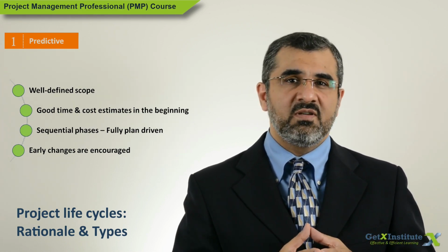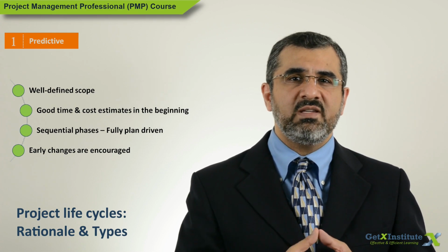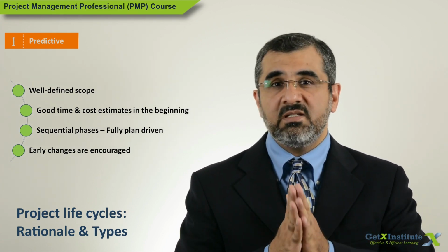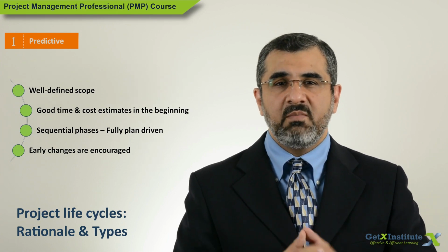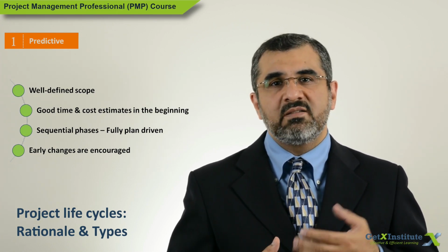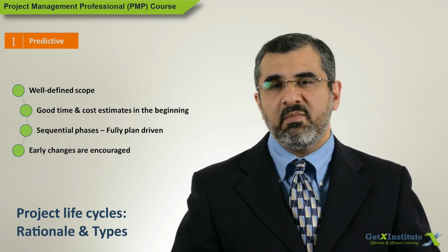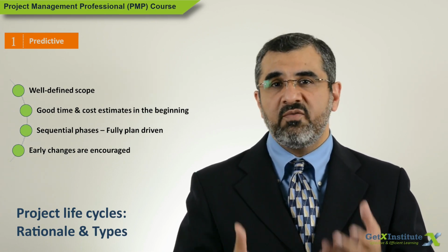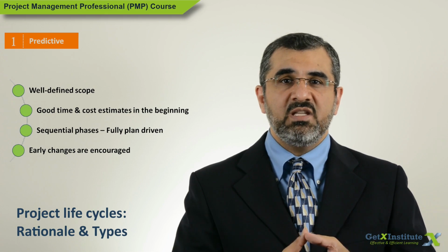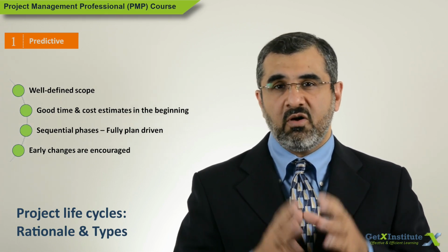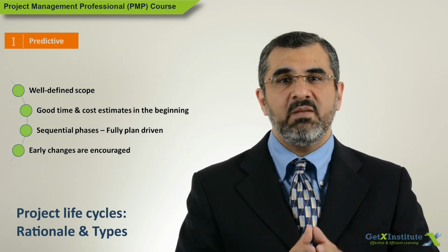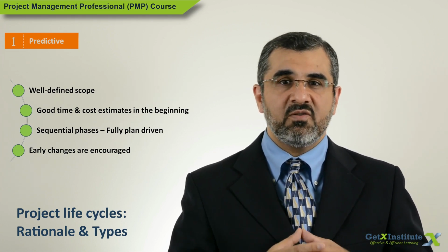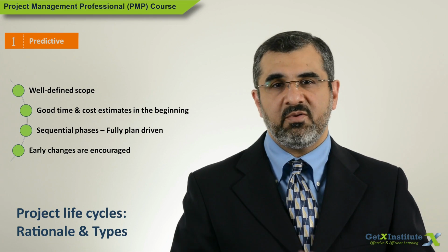With this approach, what happens if a change is requested? Let's say during testing. Such a change is hated by the project team because it now requires redoing designing, development, and testing. It will require quite a bit of rework. So any change proposed is evaluated thoroughly to ensure impact is minimum. This is why the predictive approach is also called fully plan driven approach.